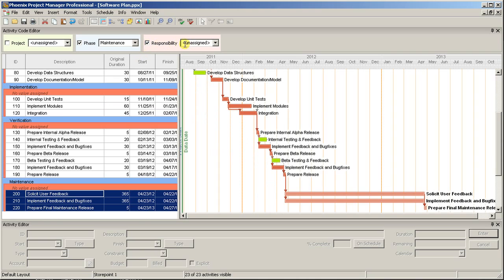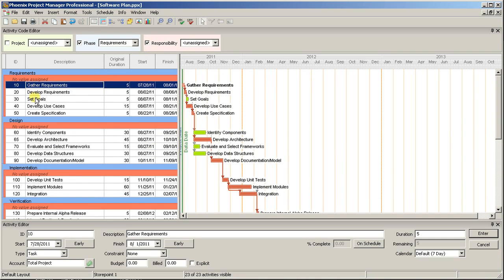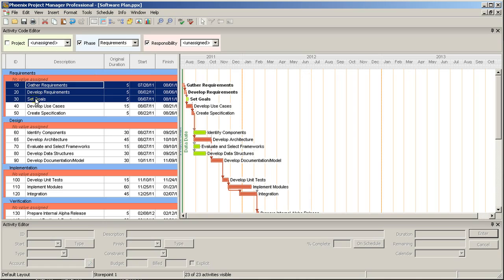Now, because we did not change the default values for this code in the Code Library, we'll want to add new values as we go, rather than reopening the library for each new edition. So you can click in the Responsibility Value box, and type a new value. When you hit Enter, the value will be saved, and the activity will be coded with the new value.